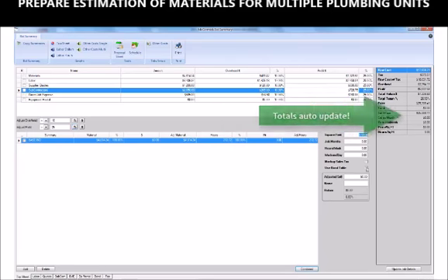Now we can add the square feet for the job. This will give us a price per square foot and hours per square foot. Not only that, let's go ahead and add in job months. Say I want to get this job done in 1 month and we work 40 hours a week. That will give us 1.23 workers per day that we will need to complete this job.